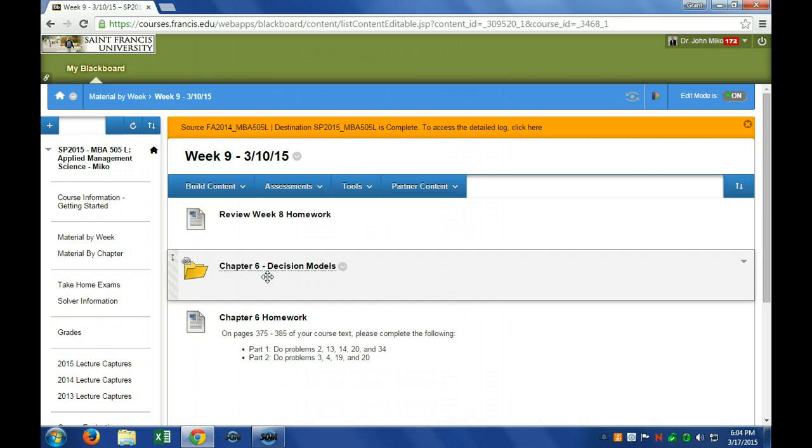So we want to build it in as a probability distribution, and the most famous probability distribution of all is the normal curve, where we have a mean and a standard deviation. The mean controls the average. Mean means average, right? The center, and the standard deviation controls how spread out it is. So we could say, hey, this is going to take 25 days with a standard deviation of 1.5 days, because that's how we talk about normal curves. But most people don't think that way. So we go from a human convention, give me the most likely case, the best case, and the worst case, and we try to go to something like this. So we go from the way we can communicate with humans to the math part.